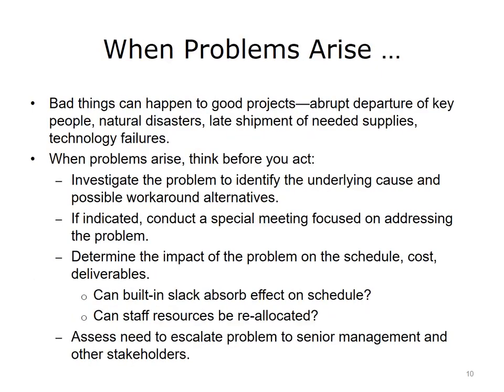When unexpected problems do arise — such as the abrupt departure of key people, natural disasters, late shipment of needed supplies, or technology failures — you must be prepared to handle them in a systematic way. First, investigate the problem to identify the underlying causes and determine possible workarounds or solutions. Bring together your project team members to discuss the problem and brainstorm fixes. Determine the impact on the schedule, cost, and deliverables. Consider whether current staff resources can be reallocated, and assess if you need to bring the problem to senior management, as critical problems may require the input of your senior leaders.